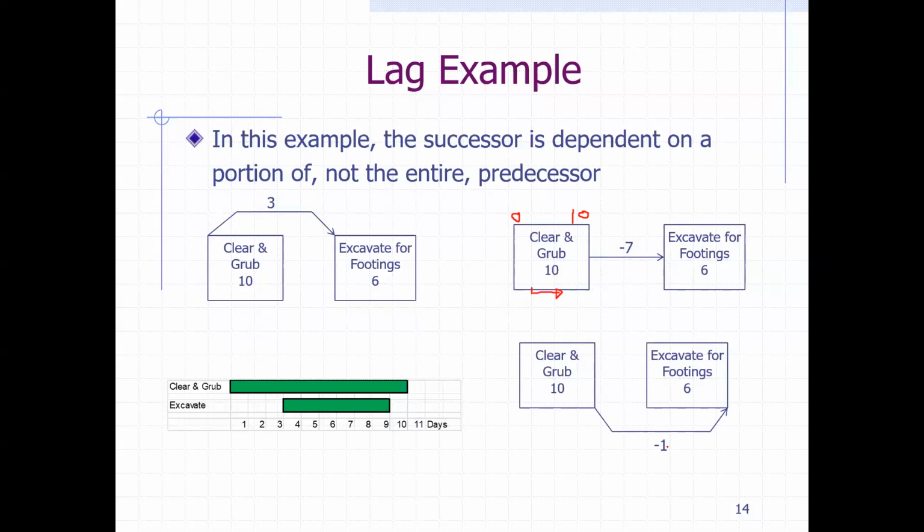The same thing here, but with 1 day duration. So to me, the finish to finish with lags is more realistic, because I'm giving it 3 days for the excavation to start after the clearing and grubbing. The same goes here. I'm giving 1 day for the excavation to start after the clearing and grubbing has begun. Okay, if that makes sense.